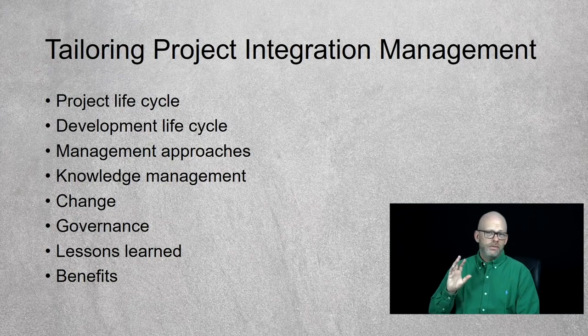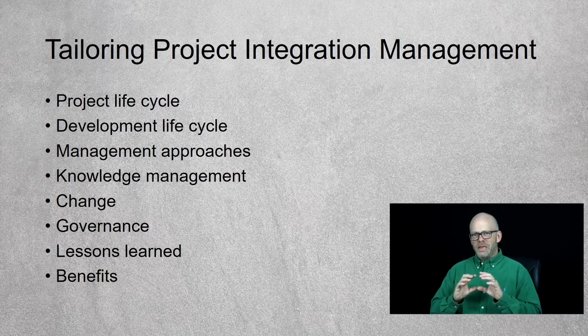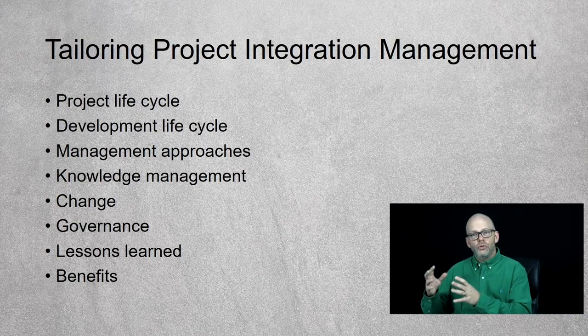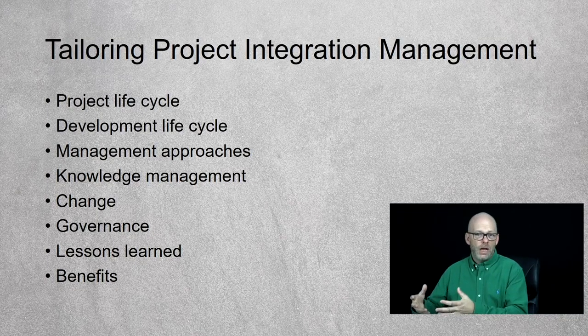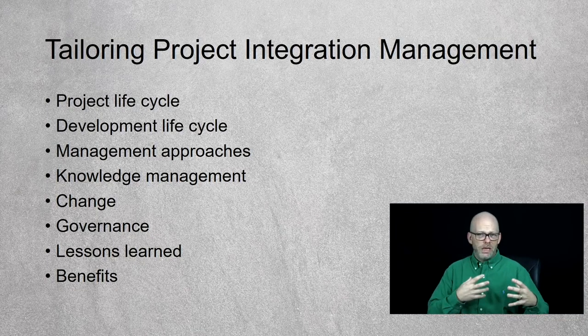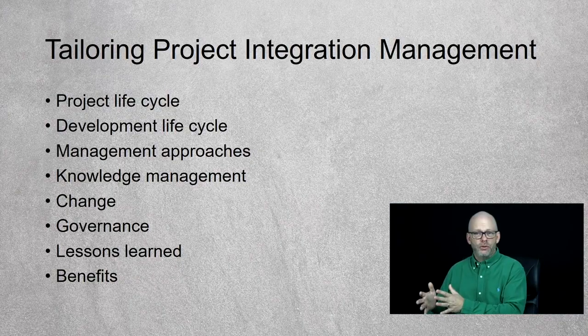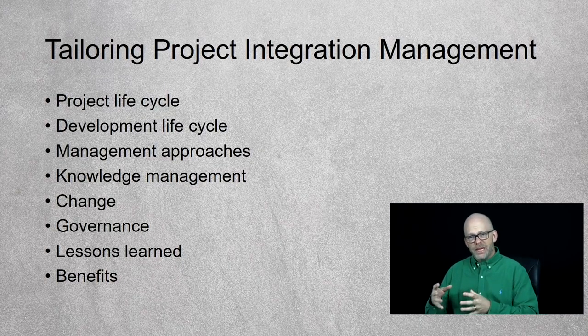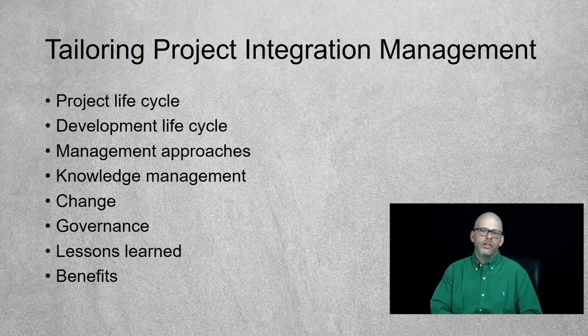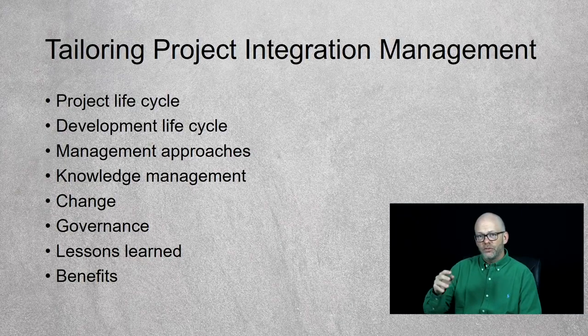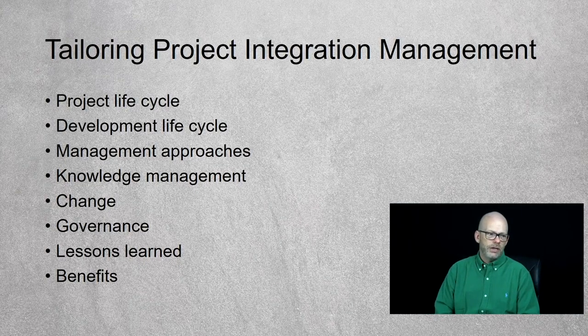Knowledge management, if it's the same type of project you're doing over and over again, your knowledge management efforts might be pretty shallow. But if it's a new type of project that's a first time, first use, for example, you might be taking a lot more notes and doing a lot more documentation because you have to support that solution. So your knowledge management might be tailored based on, well, what new knowledge is being gained. I'm not saying ignore lessons learned. I'm just saying there's different depths of lessons learned and documentation in your project.